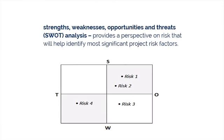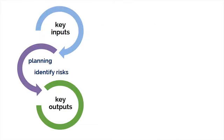SWOT analysis is a highly beneficial technique in this process. It stands for Strengths, Weaknesses, Opportunities, and Threats, and it visually provides a perspective on risk that will help identify the most significant project risk factors. And finally, expert judgment. The key output in the Identify Risks process is the risk register — a document that contains a list of the identified risks and a list of potential responses. We continue to add information to the register each time we go through one of the processes in risk management, so make a note of this as we continue through the remaining risk management processes.